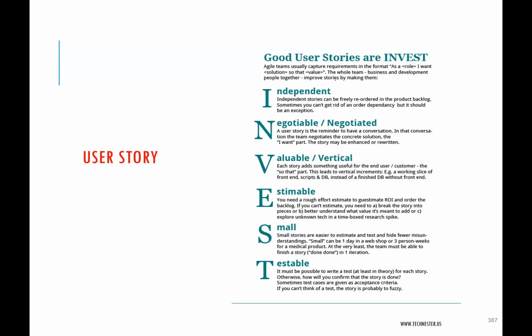So we talked about this before. I won't go into that anymore. But your user stories should address one thing. So you should not have a user story about the person should be wearing a cap and the person should be wearing a shirt and whatever, right? You can't have multiple functional requirements in the same user story. You should address one singular functional requirement.